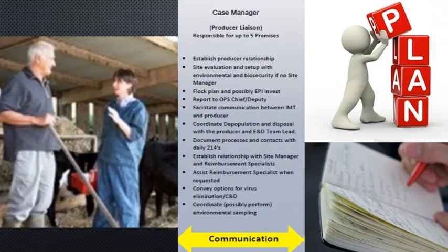It was probably a period of about 2 months, I would say, from when we finished burial to when we were able to do virus elimination sampling. During that time period, I was planning and preparing for that sampling and keeping the incident management team as well as the lab informed of projected dates of when that sampling might occur, as well as the number of samples that they might expect.